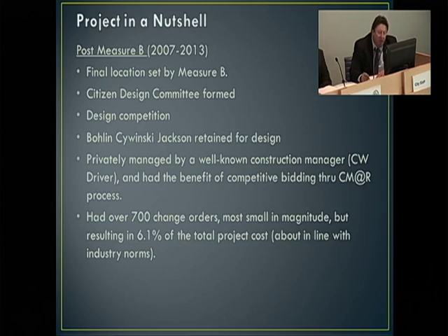So with the architect on board, the construction manager, and city staff, we worked together along with the building committee to formulate the design. At the end of that process, we decided to enter into a CM-at-risk contract. That is a variation of project delivery, which involves selecting your project manager by a quality-based selection process, and then bidding out all the various trade packages competitively like a normal bid. Then that construction manager takes on the responsibility of delivering that project at a guaranteed maximum price. And we can talk more about that if you're interested.